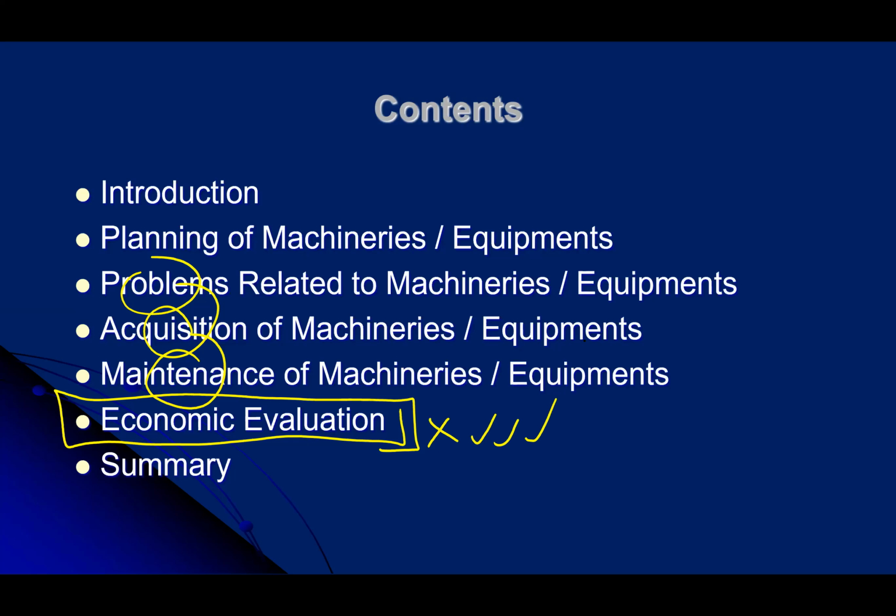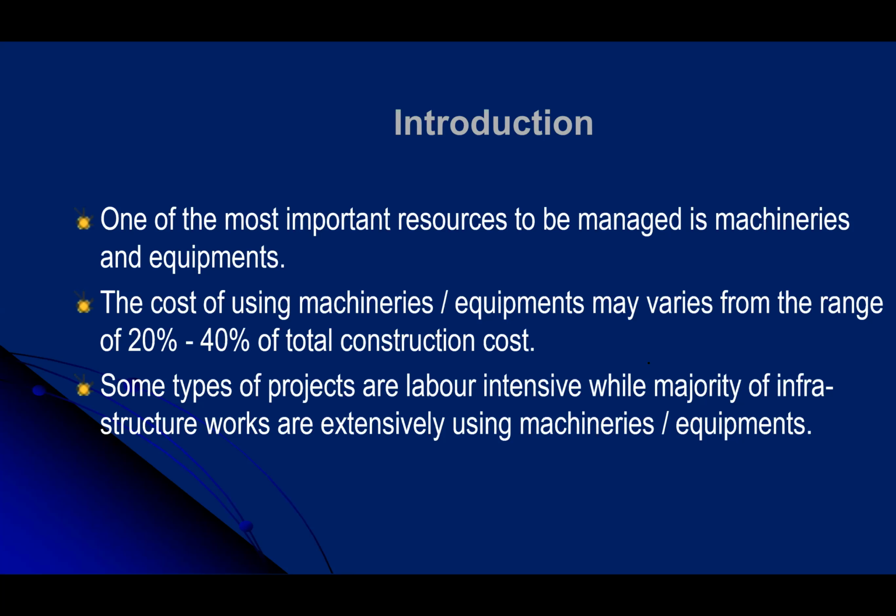One of the most important resources to be managed is machinery, because we simply cannot do away without machinery nowadays. Maybe in the olden days, a few hundred years back, everything used manual work. But now, if you do manual, the client might not like it. It could be cheaper, but it will take ages to excavate something using manual laborers compared to an excavator. You can imagine how much time you would need to spend. Even though using machinery could be more expensive, in terms of time saving it is worth it compared to manual laborers. And then, how about the cost of machinery?